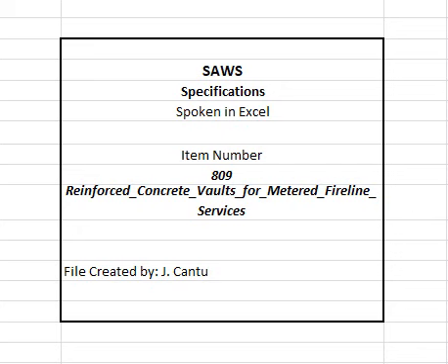809.3 Submittals. Contractor shall submit manufacturer's product data, instructions, recommendations, signed and sealed shop drawings, and certifications. All submittals shall be in accordance with the engineer's requirements, and submittals shall be approved prior to delivery. Submit the following 30 days prior to performing any work.